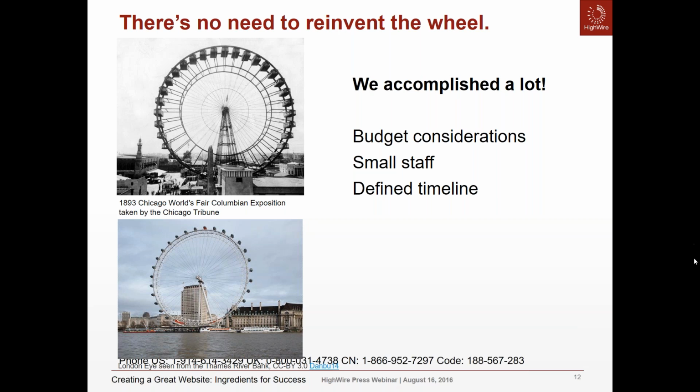And I think that one thing that came up at the end, but we handled it really well, was a change to the homepage, so it actually delayed our launch just by a couple of weeks, but it was an easy adjustment, and we were clearly communicating about it, and we were able to accommodate it. So it was a good example of having a clear vision and then just communicating and being flexible as we go forward.